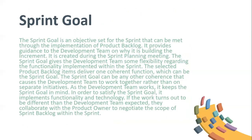Sprint goal: the sprint goal is an objective set for the sprint that can be met through the implementation of the product backlog. It provides guidance to the development team on why it is building the increment. It is created during the sprint planning meeting. The sprint goal gives the development team some flexibility regarding the functionality implemented within the sprint. The selected backlog items deliver one coherent function, which can be the sprint goal. The sprint goal can also be any other coherence that causes the development team to work together rather than on separate initiatives. As the development team works, it keeps the sprint goal in mind; in order to satisfy the sprint goal, it implements functionality and technology. If the work turns out to be different than the development team expected, they collaborate with the product owner to negotiate the scope of the sprint backlog within the sprint.